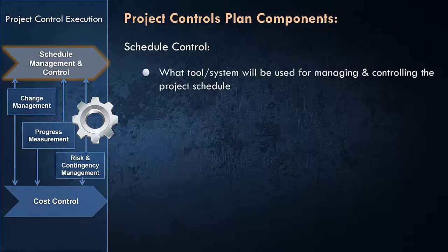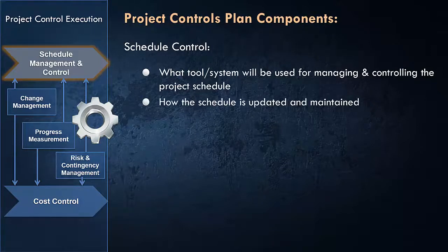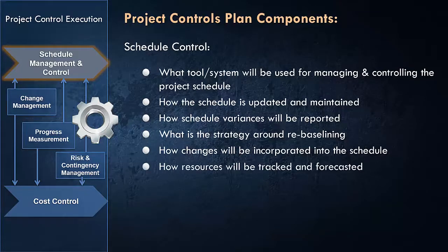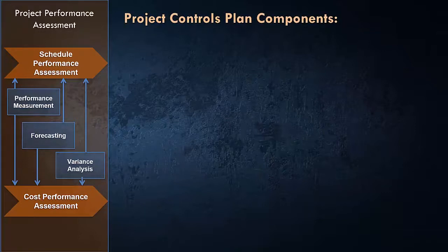Okay, on schedule control, you need to mention what tool or system will be used for managing and controlling the project schedule, and how the schedule is going to be updated and maintained. Also, how schedule variances will be reported, and what is the strategy around rebaselining, how changes will be incorporated into the schedule, and how resources will be tracked and forecasted.